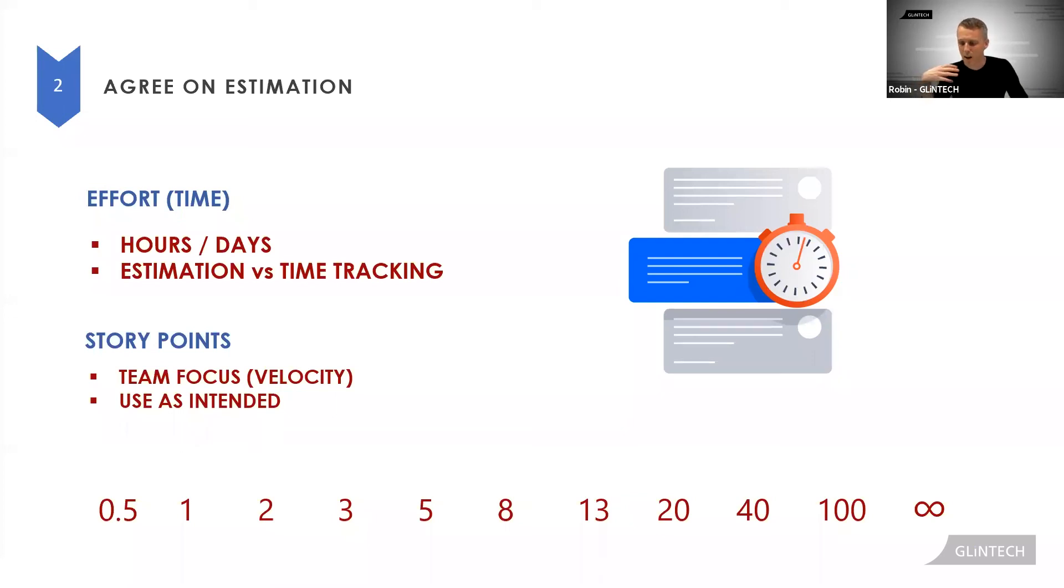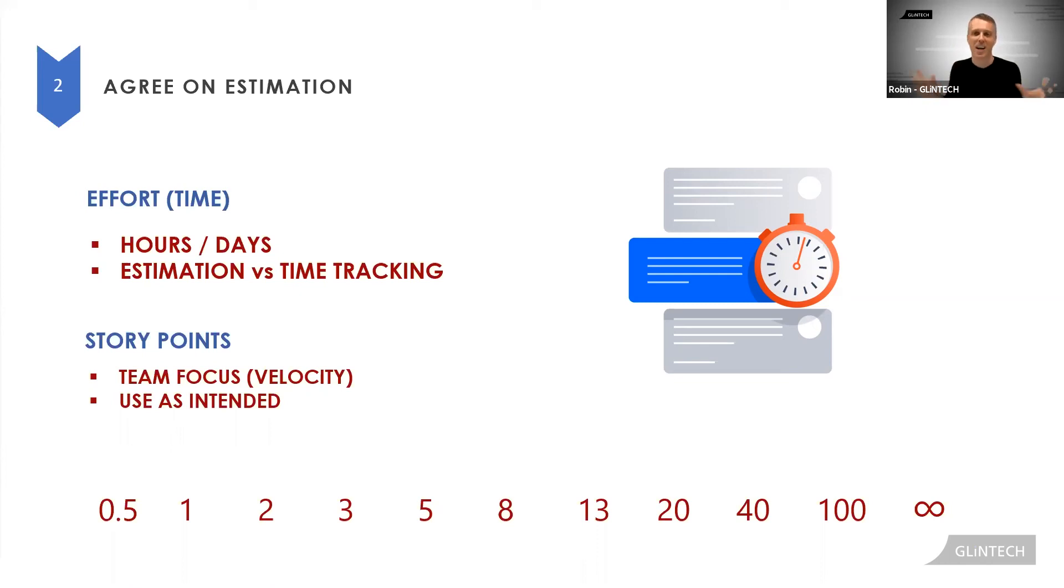If someone's saying, okay, we'll make one point as one day, you're doing time estimation. Don't confuse it. And that's fine. Just use days.